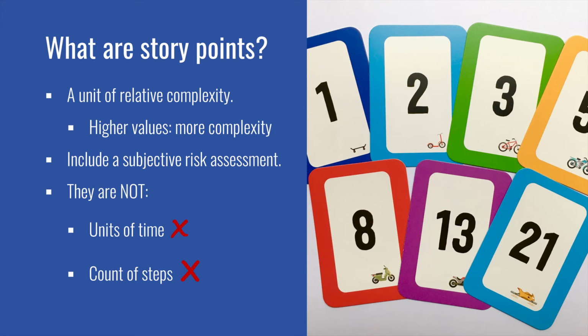We don't generally count steps, tasks, lines of code, logical branches, or anything else. We do base estimates on a shared understanding of what work the feature requires, and part of the gameplay involves checking that the team has a shared understanding. The numbers mean exactly nothing. This is because complexity is, well, complex. Instead, we focus our attention on relative complexity.